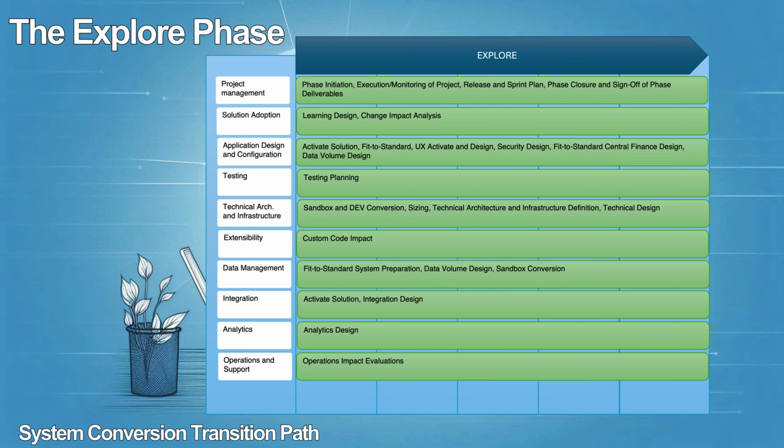The explore phase. During this phase of the project, the team performs the fit to standard analysis and prepares the product backlog. All the planning is done during the prepare phase, and the customer has signed off the phase. In this phase, the team will focus on the requirements.